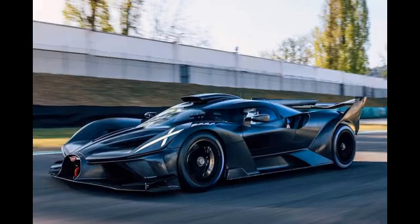Controlling. LJRC monitors the vendor's performance by scheduling regular progress meetings to review the rebuilding process and ensure components adhere to specifications, conducting inspections at key stages of the rebuild to verify quality standards are met. Completing. Measuring procurement success. Upon completion, LJRC performs dyno testing on the engine to verify the actual horsepower increase. They compare this to the contracted minimum of 5,400 horsepower. They also track the total project cost against the initial estimates for both internal and external sourcing scenarios.